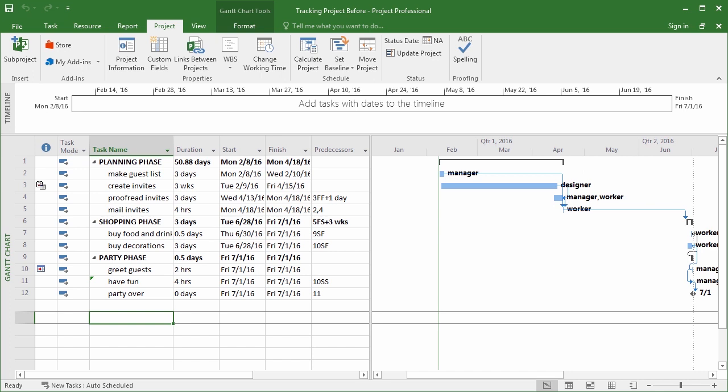There are a couple of things that you'll need to do before you begin official work, and probably the most important thing is deciding what day you'll start on. But you also notice that we've got a good amount of lag time in here. That also provides us a lot of slack. So what we really want to know is, hey, what's the latest we can start this project without affecting the finish date? And then usually we'll give ourselves a little bit of wiggle room within there.